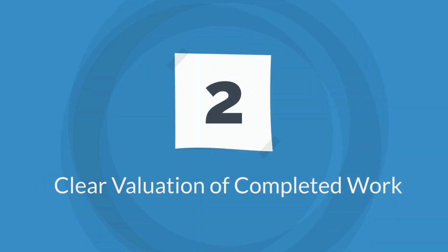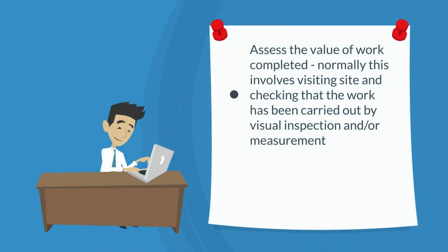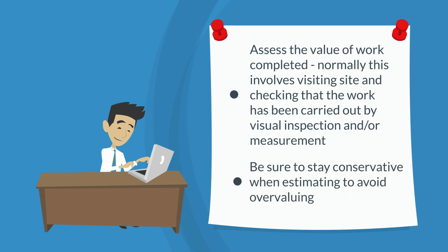Step 2. Clear valuation of completed work. Assess the value of work completed. Normally, this involves visiting site and checking that the work has been carried out by visual inspection and/or measurement. Be sure to stay conservative when estimating to avoid overvaluing.